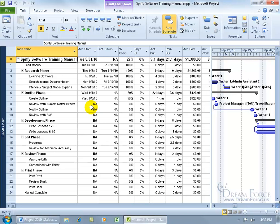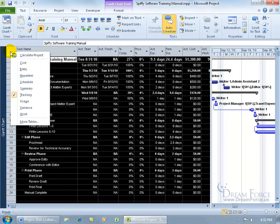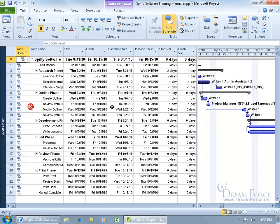And as a quick review, you can change your table here to go to the variance table to do the comparison by coming up here and right-clicking on the table header and going down to variance. And there you go.